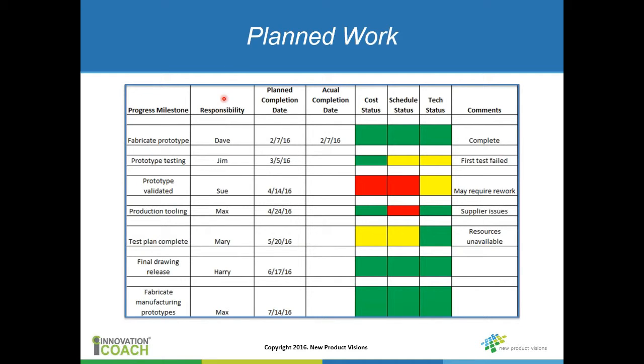And so the concept here is you take this overall project Gantt chart, for instance, and you hone down into maybe a 2-month window. Now, it depends on the scope of your project. If you've got, say, a 2 or 3 year project, then maybe a 2-month window is appropriate. If you've got a 6-month project, well, maybe a 1-month window. So you're going to hone down on a specific subset of the project, that window into the project that you're really focused on right now.